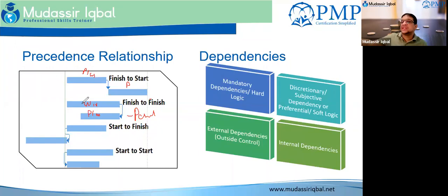They are doing the wiring and making it available for the fixtures, and the person doing the plastering is making sure that all the holes and cuts the electrical team has made within a room are fixed. So this needs to be done together so that the painting can be started. What is the start to start relationship?